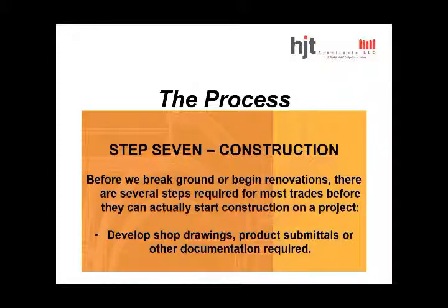Product submittals, other documentation, including something called site observation, where we, as the architectural component, actually go out and view the construction numerous times during the project to make sure that it's being constructed at the level and the quality that is in fact required by what we put out in the construction documents.